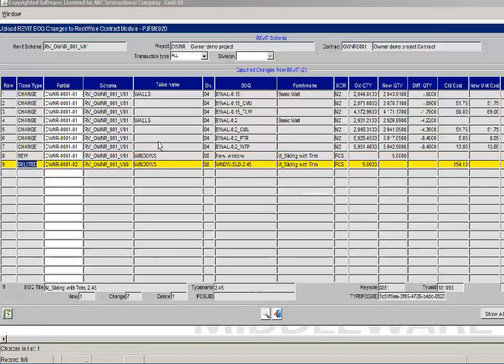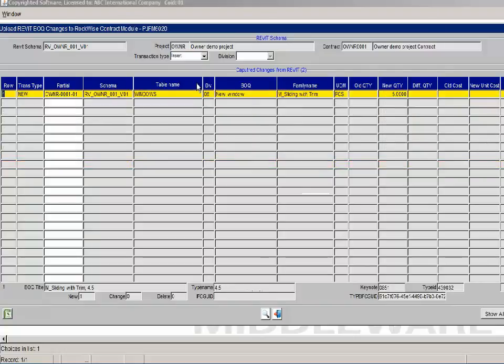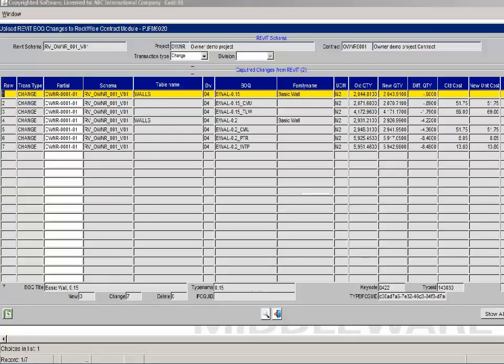You can filter all the new items to check if those additions fit your needs. Also, deleted or replaced items can be tracked separately. The cost of the deleted items is automatically generated by the system as per estimations made previously. Changing windows and their sizes also changes the walls around them, so the system tracks up to the slightest millimeter the plastering, paint or CMU changes in the wall size.